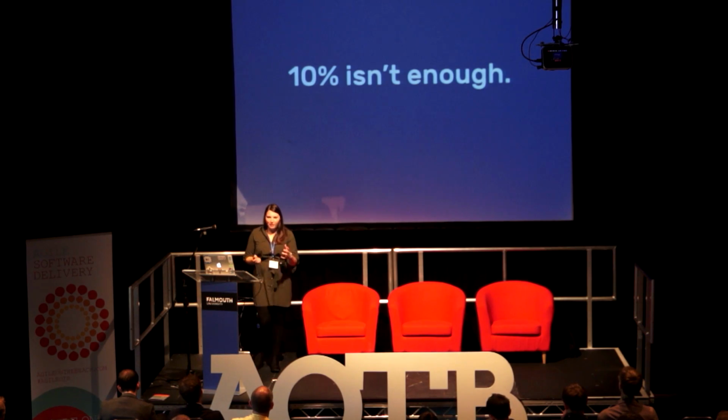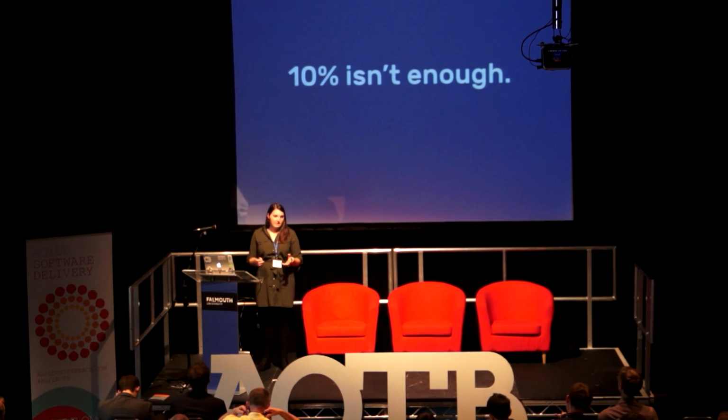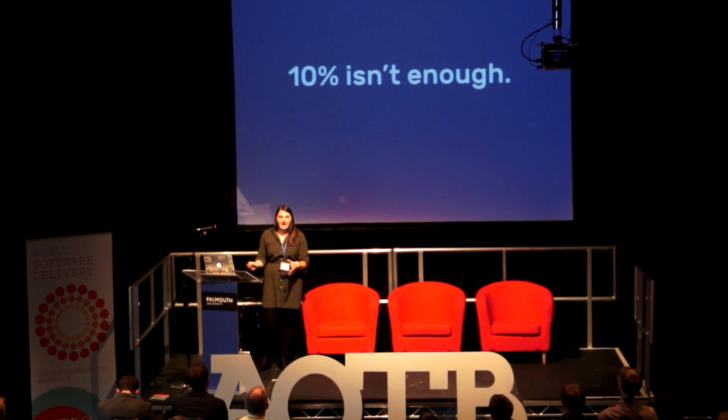And one of the final challenges of 10% time is that 10% isn't enough. So maybe this is why people like LinkedIn have tried something where you get a longer period of time. We know very few things can be planned, engineered, tested and put into production in a single day. And often the ideas that teams come up with are going to span weeks and weeks. Something that might have taken 5 days will take more than just 5 days of 10% time because you're constantly context switching.